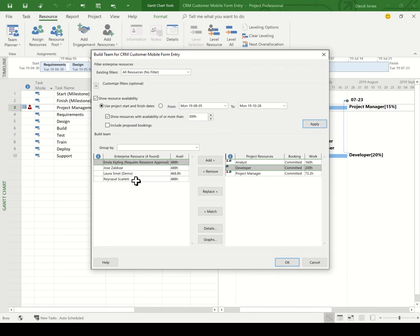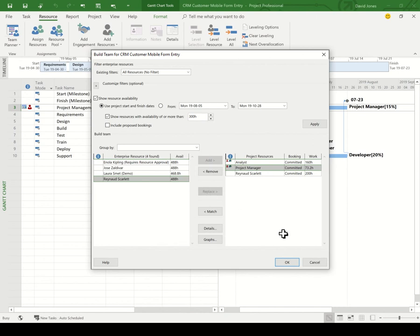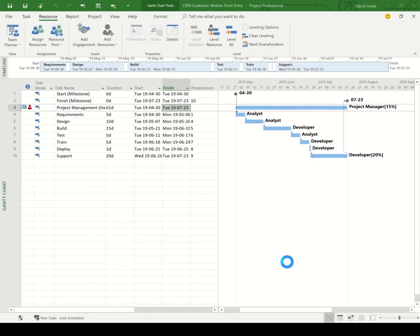Raynaud is a good person and can do the work. So I'll simply hit the replace now to replace the developer role with Raynaud. I'd continue doing this for all of the resources, and then I'd save and publish my project to assign the new people to the project.